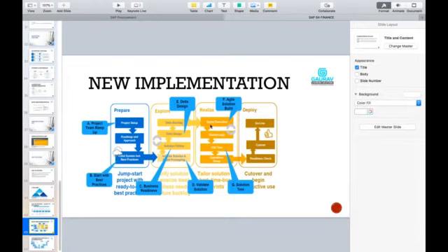Now in realization, normally what we do, we complete the realization in 4 months. For 4 months, no interaction with the customer, because the customer has finalized this list and we are working on the configuration. After 4 months, when we complete the realization phase and ask the customer to test, on day 1 itself he raises a lot of problems.